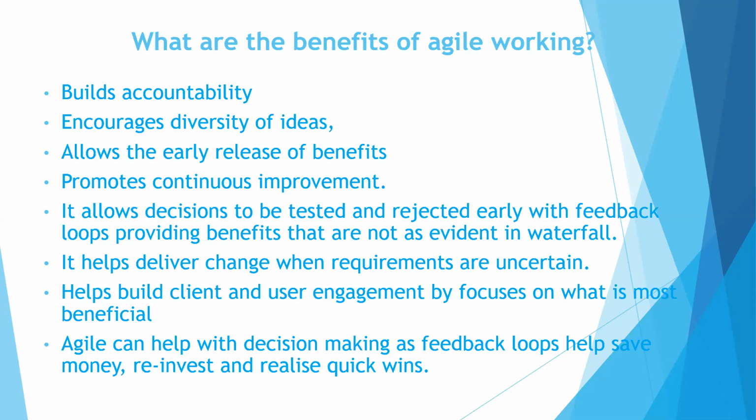Meanwhile, somebody building that website from the beginning, not launching immediately, has to wait until all those 8 features are built, maybe 6 months. But with Agile, within the first 3 days your picture is there, your payment method is there, people are already seeing you, you're already making sales. At the end of the day, you might say, okay, wait, let me maximize my investment now. Maybe I don't even need to do all these 6 features now. Let me just do 3 and reinvest the money in other areas. So it makes you take decisions and allows us to judiciously get value as early as possible.